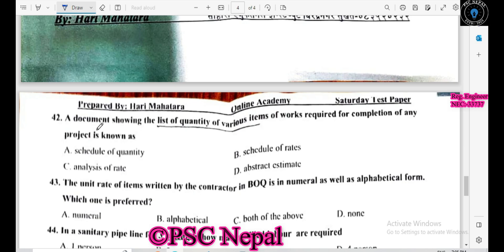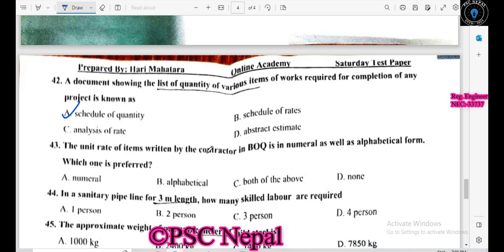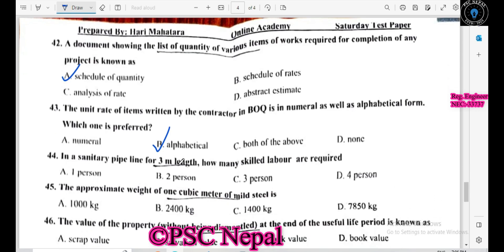A document stating the list of quantities of various items of work required for completion of any project is known as the schedule of quantities. The unit rate of items written by a contractor in the BOQ is in numerical as well as in word form — the word form is preferred. In a sanitary pipeline for a three-meter length, a specified number of skill levels are required.